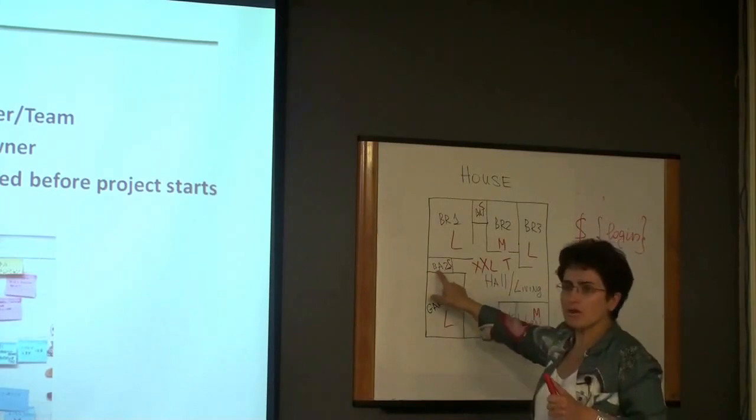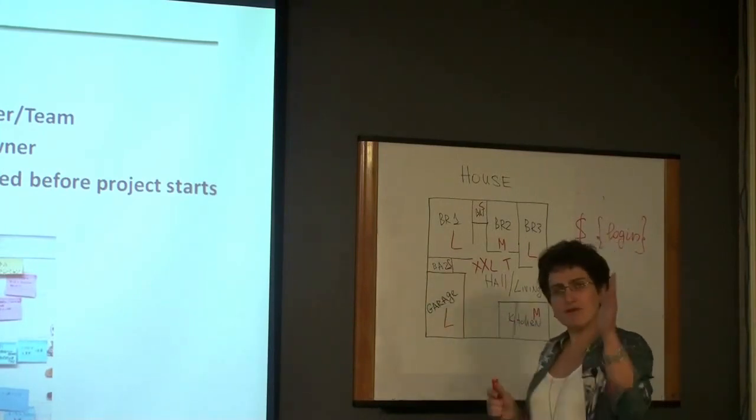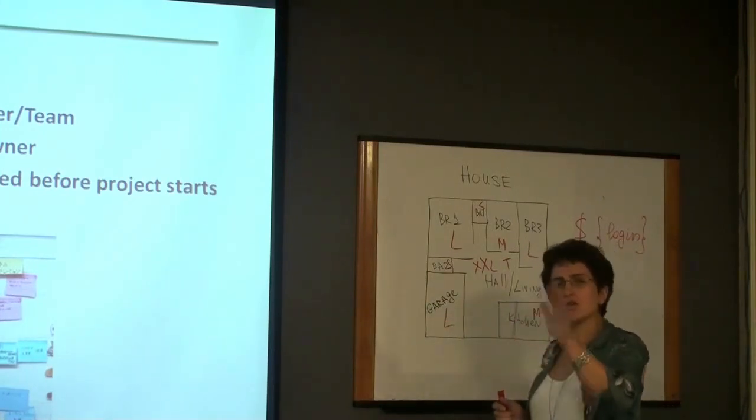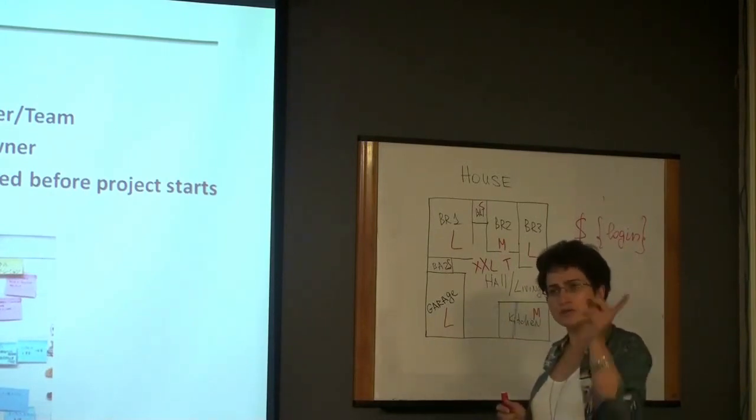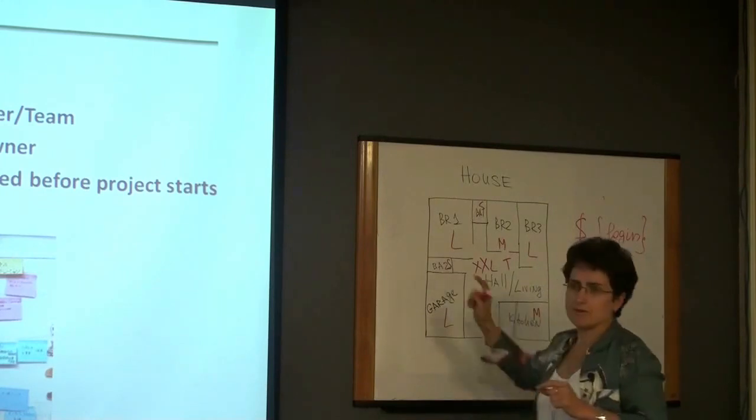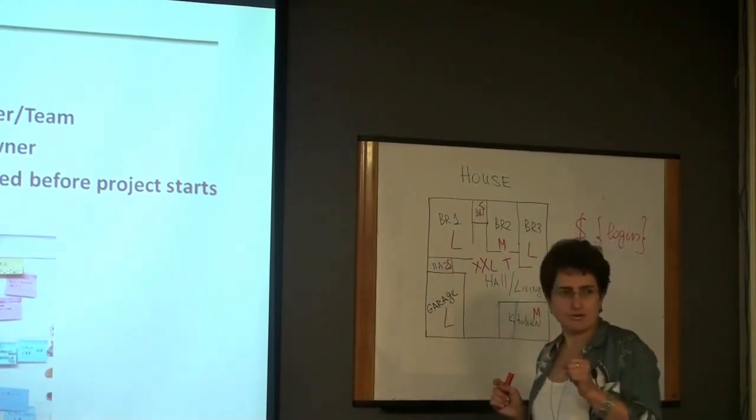So you take the smallest feature, and both development and QA guys look at this feature, and they collectively try to understand how long it will take them to develop and test this feature, right?